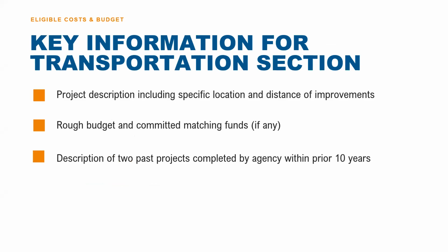So what is the responsibility of the public partner if they contribute improvements to the ASIC application? The public partners will provide budget information and oftentimes fill out the transportation sections of the application itself. Basically, this boils down to providing a basic project description of the STI, TRA, or program components. Just to give you an example, a local Department of Public Works would describe a proposed bike lane and would provide the distance measurement of that bike lane. And the description on the ASIC application would be short, no more than one paragraph.